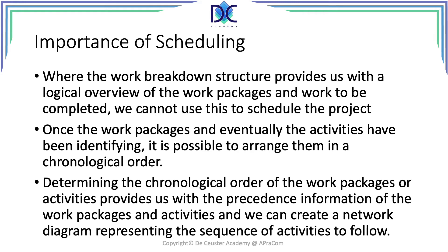Arranging activities in chronological order means identifying which activities or work packages have to be completed before a specific one can start. We sequence them in a specific way: finding which activities can start at the beginning, which activities have no predecessor, which have predecessors, and which have successors. Bringing all this together, we can create a precedence diagram.